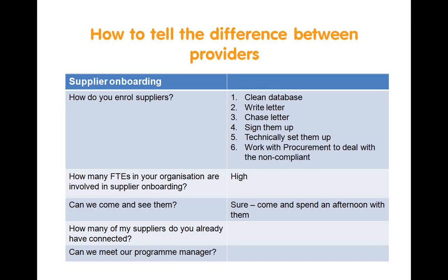How do you onboard suppliers? I'd be looking for answers like, well, we clean the supplier database to make sure that when we communicate with suppliers, we're talking to the right kinds of suppliers. We help you write the letter, and we'll help you draft a really strong, powerful letter that will work. We've got templates of good letters, templates of letters that haven't worked so well, and you can choose which one you'd like to go for.